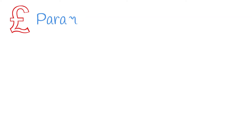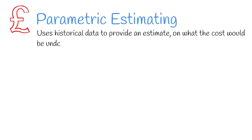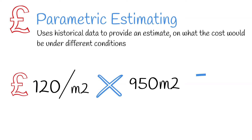Moving on, we have parametric cost estimating. This method uses historical data to provide an estimate of what the project would cost under different conditions. It's achieved by identifying the unit cost from past projects, and scaling for the project that you're estimating.